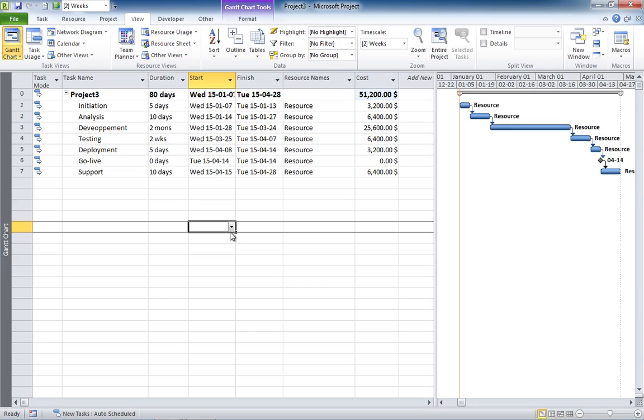But don't despair, there's a little trick using the OLE link mechanism that allows the creation of what we call hammock tasks. Like a hammock, those tasks are linked at the beginning and the end.